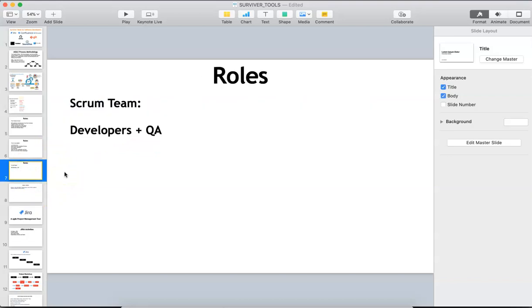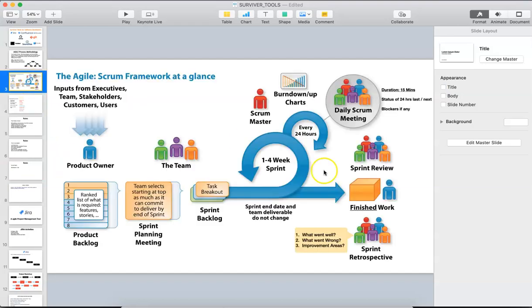This is all about how the Agile methodology works, who is involved, what the roles of each person are, how many meetings there are, and how the larger requirements are divided into smaller requirements. Those are called stories. A story contains the backlogs. Backlogs are divided into sprints. The sprint duration will be 1, 2, 3, or 4 weeks, but generally 2 weeks is preferred, and most companies follow 2 weeks.